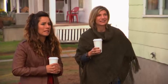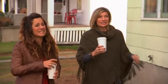We've got some bad news. Just because of the vintage of the house, there could be asbestos in here. It's most likely the shingles on the outside of the house. Okay. We've got to look into it. How long is this gonna hold us up? Well, the test can take up to 10 days. But Kyle, come on. I'm going to have a guy come in tomorrow, and he's going to do a test. As far as demolition, we need to hold off until we get the test results.